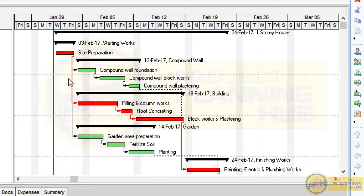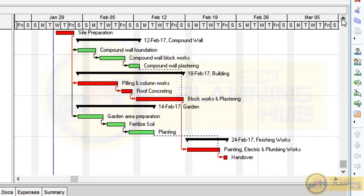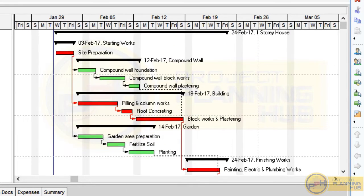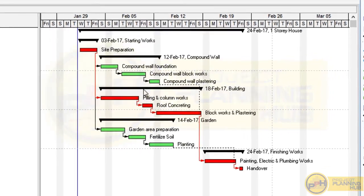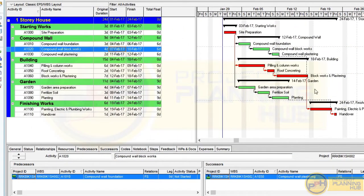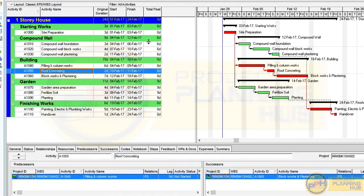Now we can see all activity bars rearranged based on the links and durations. The last activity may be missing from the Gantt chart — scroll down or drag the bottom boundary to see it. All activities are now visible. The activity bars are rearranged and we have dates for all activities. The path formed by the red activity bars represents the critical path.